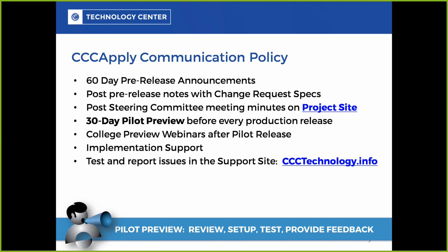There are several reasons why we're doing this, and we're going to take advantage of it to clean up a few bugs and work on some accessibility stuff. But first of all, our communication policy is now that for a supplemental release like this one, we are going to give you a 60-day heads up, if not earlier. This is what's going to be released. This is what we're working on, 60 days in advance.